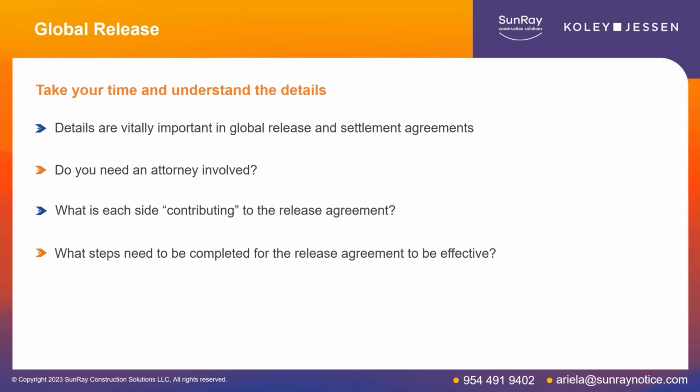And at that point in time, you should stop and consider whether you need an attorney involved. The reason we suggest this is not just because attorneys, or clients involving us in these disputes, is how we keep food on the table at home and our lights on. But it's because there are times where nefarious players will try to sneak things into releases, give up additional rights, or require you to take less money than maybe you're entitled to, but still provide full warranty on the project or indemnification and defense obligations, which could be the subject matter of an entire webinar.